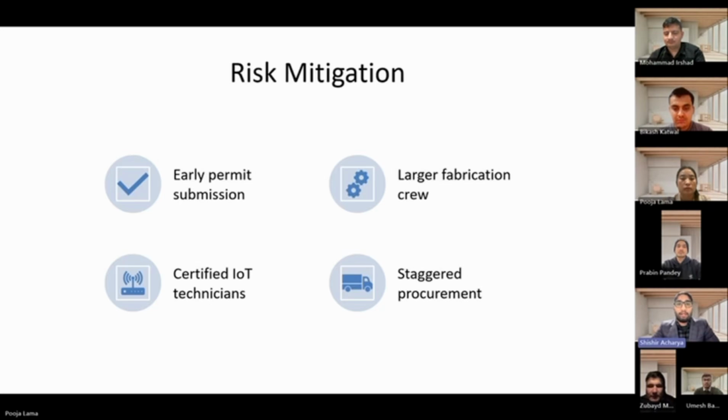Permit-related risks are minimized through early and ongoing communication with the City of Surrey, and weather risk during transportation and crane work is covered through built-in schedule buffers. Finally, we have allocated a structural contingency of about $574,000 to protect your budget. Overall, Mr. Sponsor, these controls ensure your project stays on schedule, on budget, and fully compliant.